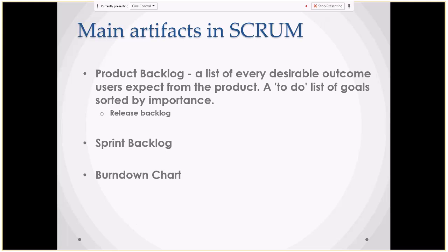These are the requirements that we are going to consider and develop and deliver. Those requirements will fit into the sprint backlog. Of course, the sprint backlog will be filled from the product backlog. We will have a product backlog with all the requirements first, and then from there, certain requirements we will prioritize and get into the sprint, which is called another iteration.